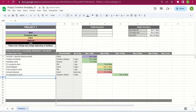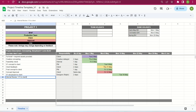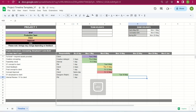Once Ralph's storyboard is in, we add an internal review to make sure we've met everything in the client's requirements and any notes from the concept approval. We can do the internal review and send V1 to the client on the same day — that's the PM's responsibility. We give that one day, so that would be Wednesday the 17th of May.